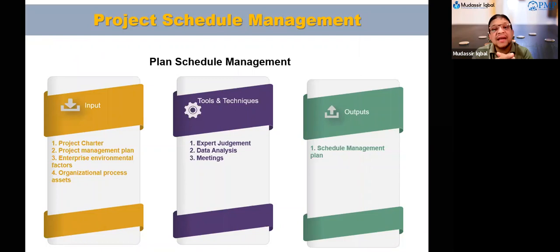Organization culture has a very big effect on the project schedule. What kind of organization you are in has a direct impact on your resource availability. You should be looking at commercial databases. You also should deal with external and internal clients, and how you are going to deal with the constraints and milestones, because if there are external clients, you might not be able to change your milestones a lot, but if they are internal clients, you can deal with them internally. So these things will impact your planning and the schedule.